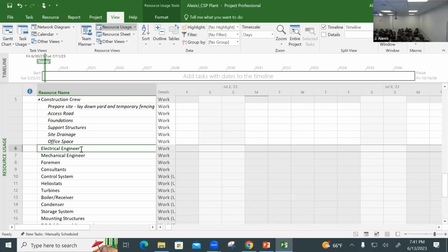And I showed you actually a screenshot about paint wall, for example, that has painters, tapes and paint assigned to the same one. So you need a painter, a person to do it, but also you need material, and you could have all sorts of different types of resources assigned to a project activity. Does that make sense? All right.